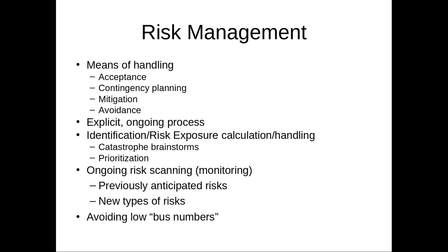Mitigation is before it materializes. Good. And what does it seek to do? This is an important point. It reduces the likelihood of the risk materializing. That's actually one of 2 things. Reducing impact, or reducing impact if it happens. So there are 2 variants you'll find. Sometimes it is both. Basically, risk mitigation strategies lower the risk exposure.